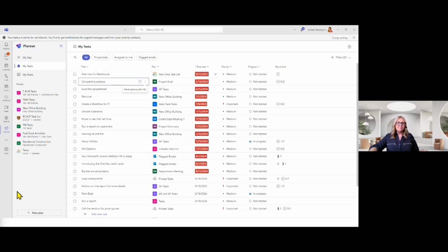Notified when they're completed. I have to keep checking. Correct. You would want to create a workflow. There's actually a Power Automate feature that is built in. There's a template for it in Power Automate that you can use to get a notification. So as soon as a task is marked as complete, and you could even say if it's this person, or if the task was urgent or important, there's a lot of detail that you can actually give the workflow to say only notify me if these things, because we put conditions in there.